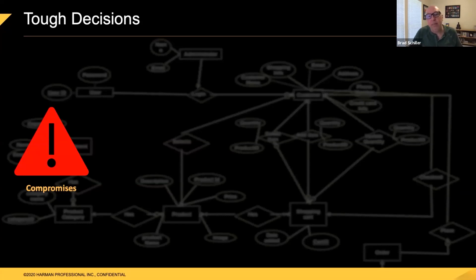The other thing that can happen compromise-wise is feature creep. This is where different stakeholders, it could be the engineers, it could be the sales team, might say, you know what, this is looking really good, but what if we put LEDs on the outside to make the whole light glow? That'd be cool. And now there's feature creep, and that gets added in, and that's going to cost more money, and it might be another feature, it might be more mechanics, it might take more time. All these things weigh in during the development.